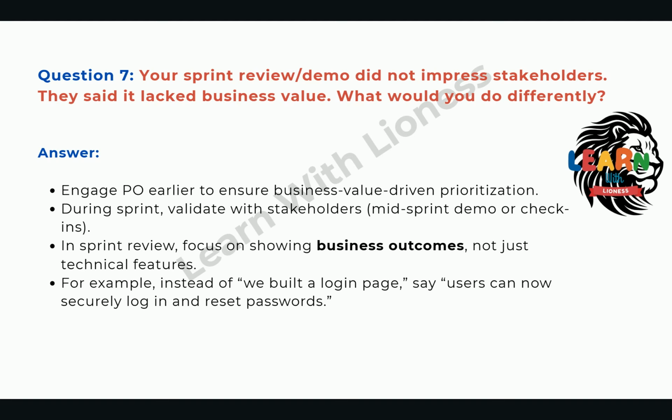During the sprint, validate with stakeholders through mid-sprint demos or check-ins. In sprint review, focus on showing business outcomes, not just technical features. For example, instead of "we built a login page," say users can now securely log in and reset passwords.